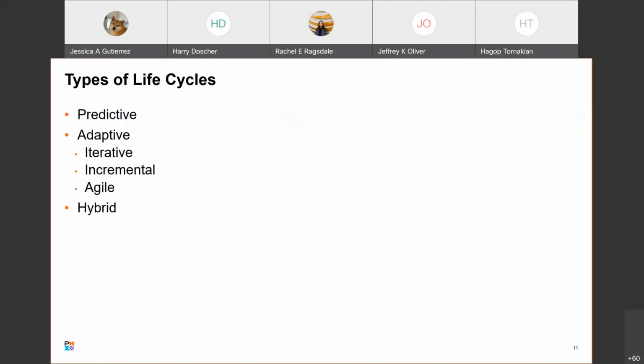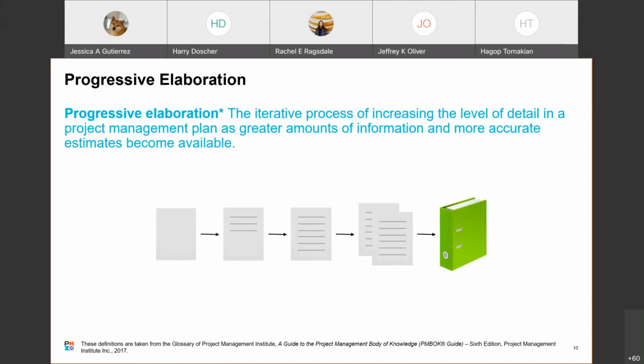The first one was progressive elaboration. That's really documenting the best that you know at any given time, and then exploring and finding out more and more detail about what you need to do or how the product has to perform, when it has to go to the customer, things like that. So you're starting from a blank slate, and you put down your initial thoughts, and you keep evolving that until you've got something that is really workable, and make sure it's back there in your project plan.